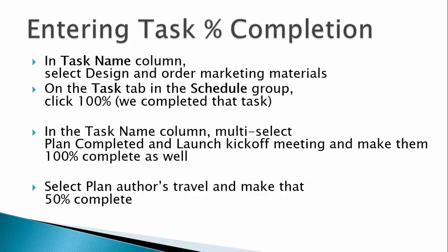To start with, use the percentage buttons to indicate that design and order marketing materials, plan completed, and launch kickoff meeting are 100% complete. Make plan authors travel 50% complete. Observe the check marks that appear in the indicator column.